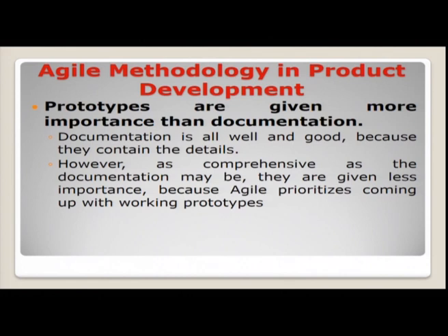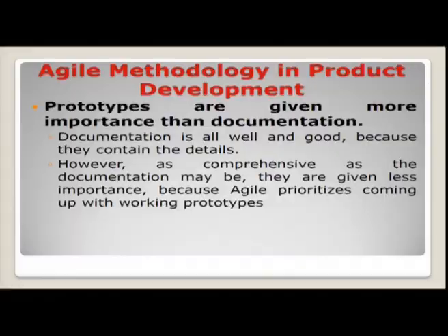My dear viewers, in your subject called software engineering, you would have studied the prototyping model, evolutionary prototype and throwaway prototypes. Here we build mostly based on the evolutionary type because we need to have a working model, the working prototypes, smaller deliveries. When you work with the Scrum framework, you deliver the minimum marketable feature, which means the feature which is being developed should be marketable and should have a limited set of functionalities.